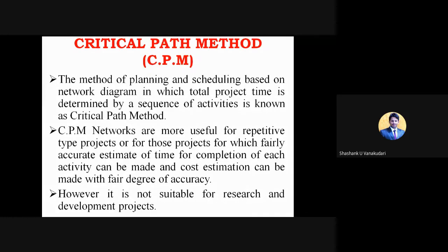However, it is not suitable for research and development projects. If you go for new projects, it is very difficult to adopt, because we will not know how much duration a particular activity is going to consume, and how many resources it will consume. So it is very difficult to monitor new types of project works.